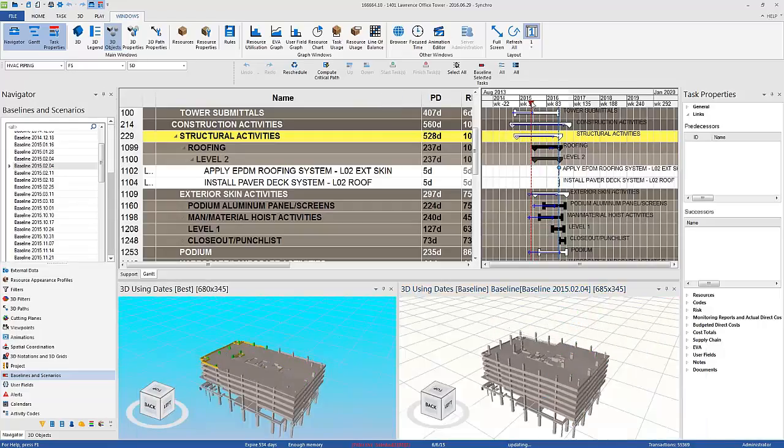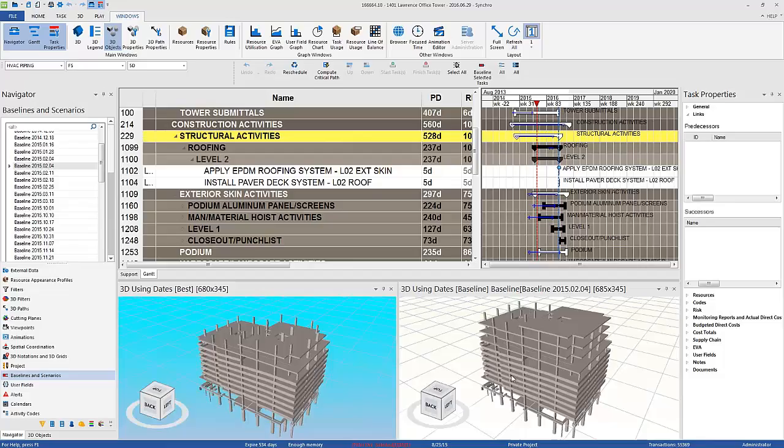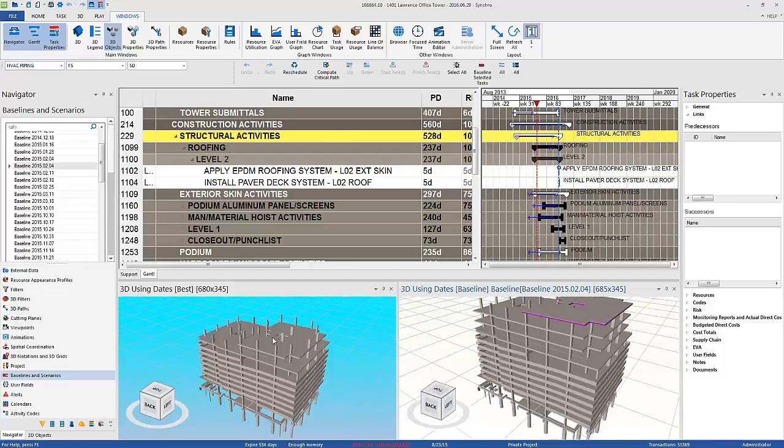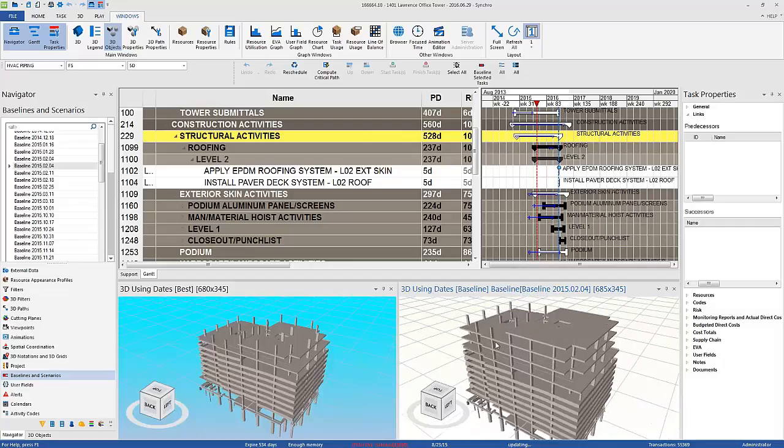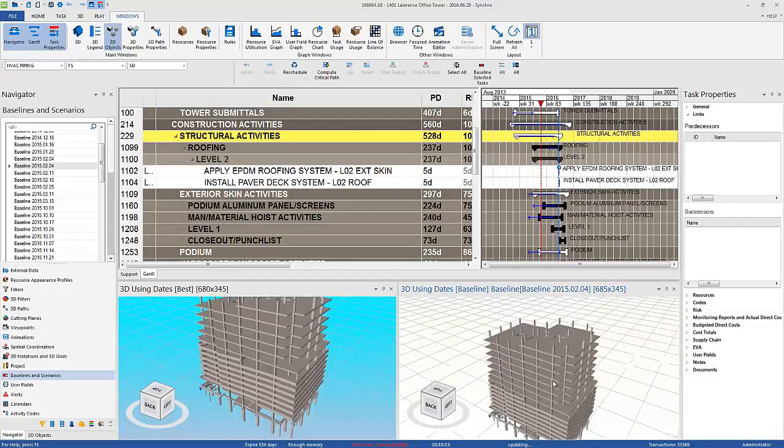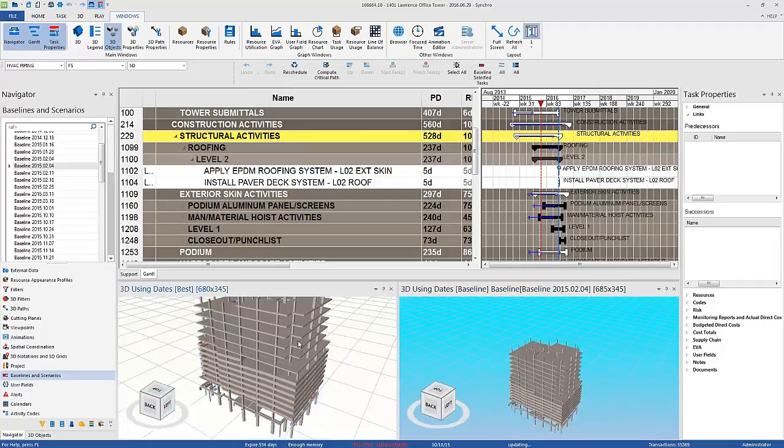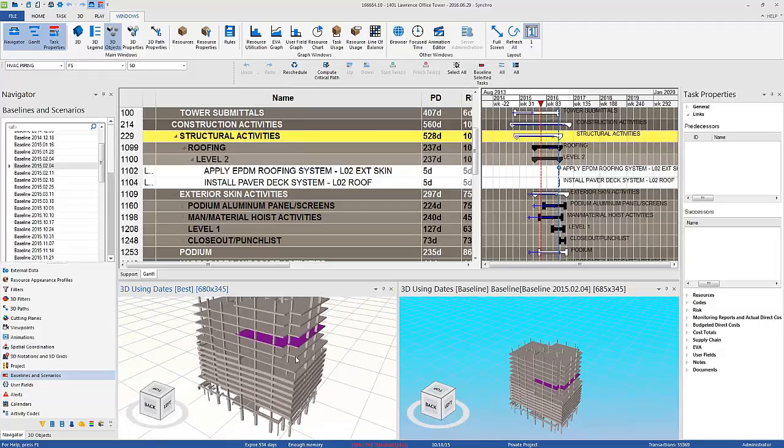We were doing that to say, hey, this is where you're contractually supposed to be, but you're supposed to be here, and you're still down here. You need to speed up, and that would help them understand how far behind they were. And it was on them, because we had negotiated the contract based on this sequence of events and these durations. If they're not meeting them, it's a good way of explaining where the schedule really is. So yeah, it's terrific.